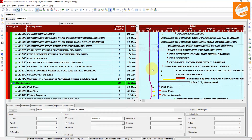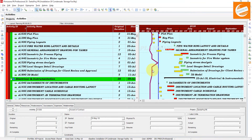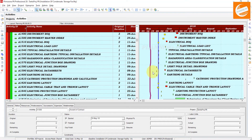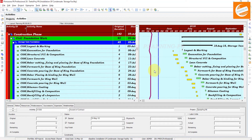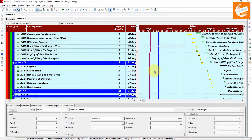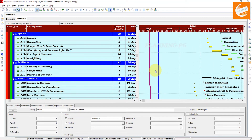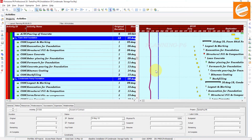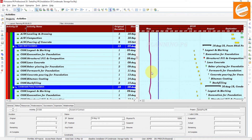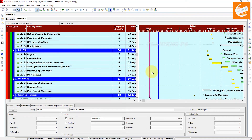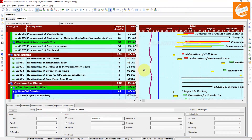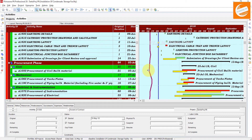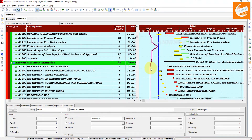You can see the behavior of your progress line — it is showing whether you are ahead or behind from the schedule. Because this schedule is not updated, it is behind the data date line.